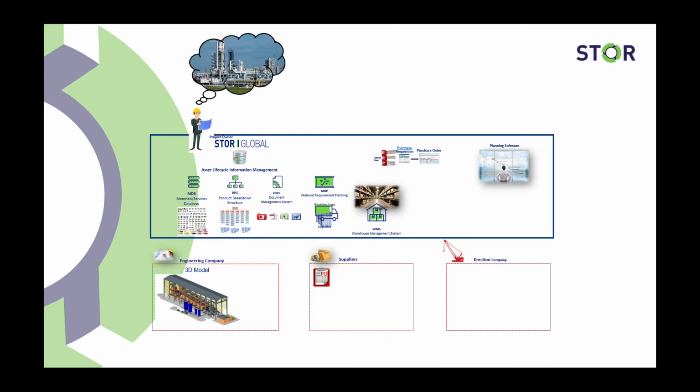As soon as the project owner company gives the thumbs up, the supplier then dispatches the material, and this material will be ready to be received and stored in the proper warehouse. In the moment that the material is received, it is once more confronted with the PO and the packing list to certify all proper material is being received.